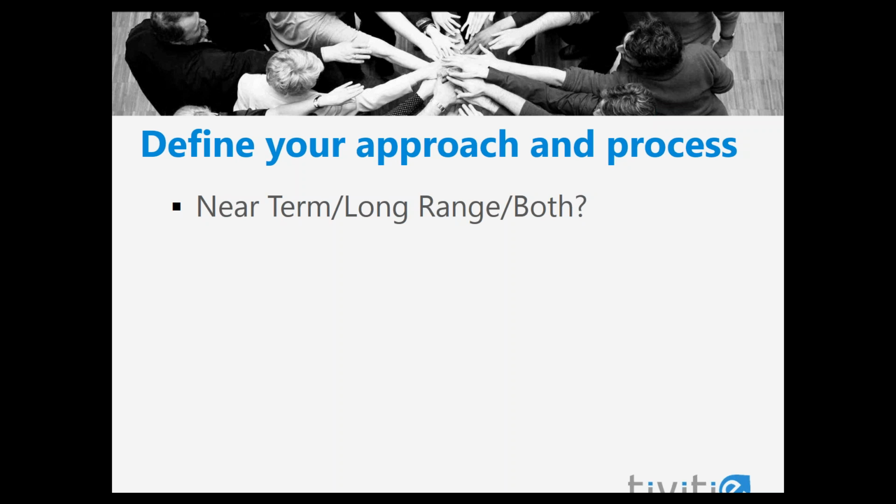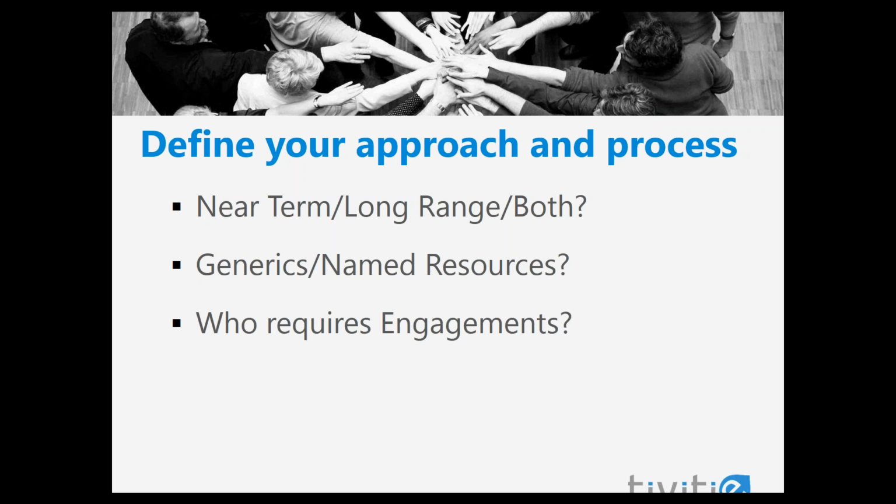What is the time window for requesting resources? Should they be requested a week before they are needed or a month before they are needed? If you're doing long-range planning, should requests be approved immediately? Another consideration is how you are managing resources. Are project managers submitting requests for generic resources, and then these will be replaced by the resource managers with named resources? Or can the project managers request specific named resources? And then finally, which resources in your organization do you want to require engagements for? Will they be required for all resources or only for your most critical ones?